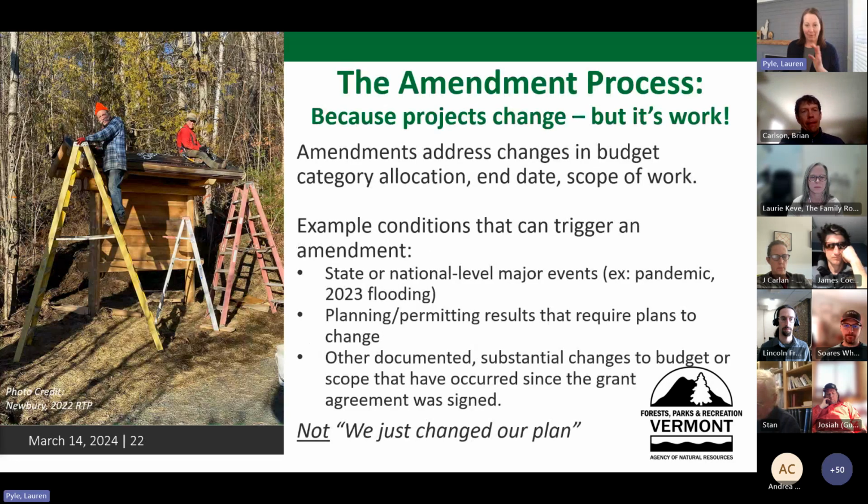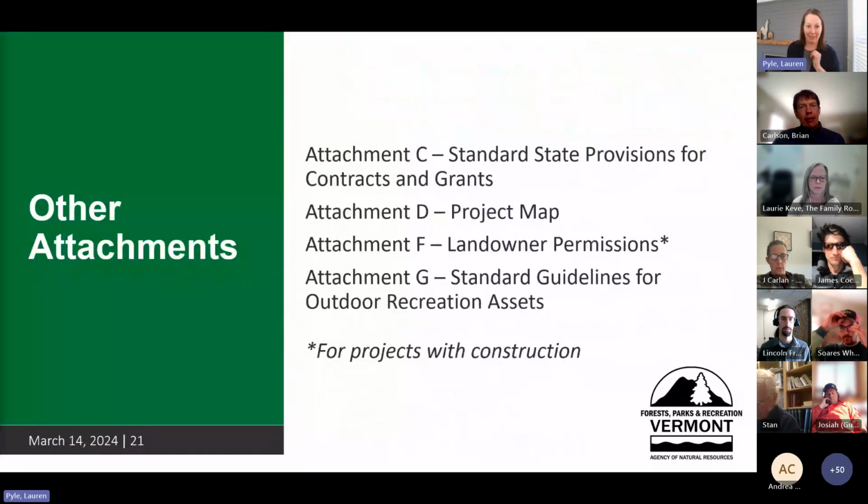So I'm actually going to go back to the other slide and pause, because I see some questions coming in the chat. So starting work in June, say the first invoice September 1st and every 3 months. Yes. Because you can't do any pre-award work unless you're flood recovery. September is generally when we're going to start to see the first invoices come in. If you're flood recovery and you already have expenses, basically once your grant agreement is signed, we'll be able to start that reimbursement process for any pre-existing work.